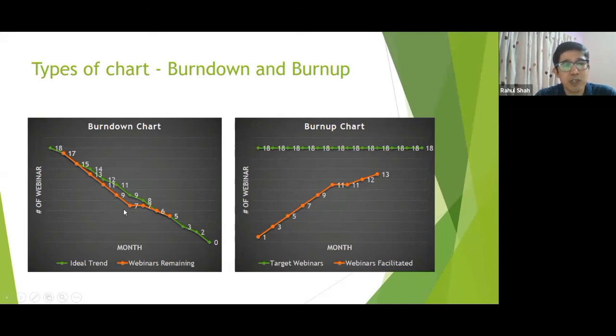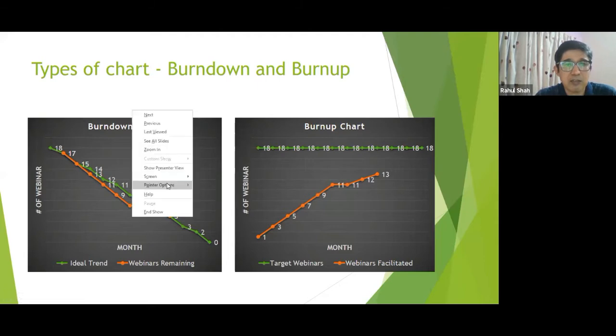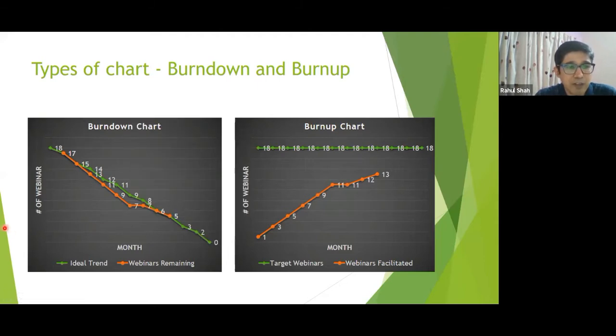Yeah, so in the first one, we are showing what is remaining. So we have reached here. If there are some numbers, I'm putting the number of webinars, but whatever, hours or something, you know that, okay, now how many days are remaining? We have 4 days remaining, and this much work is remaining. Will we be able to complete this? That's what it is showing. And this one is showing how much work we already completed and what is remaining. Still the remaining part here as well.